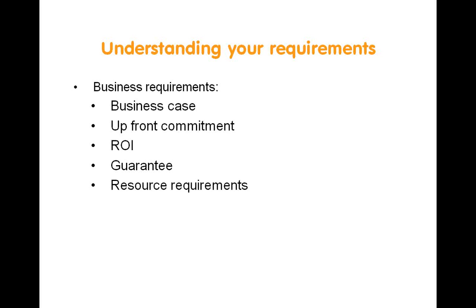And also understand what your resource requirements are at your end. How many people do you need to plug into this program to make it work? And how much of their time, is it a 6-month project, is it a 12-month project, is it indeed a program where somebody's going to have to be on it at all times?